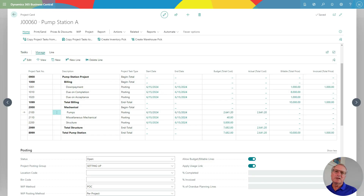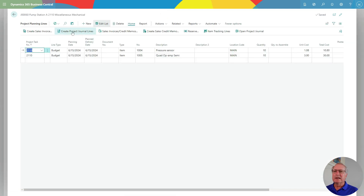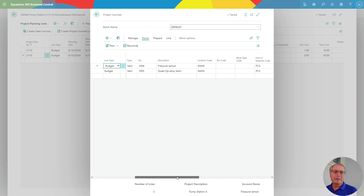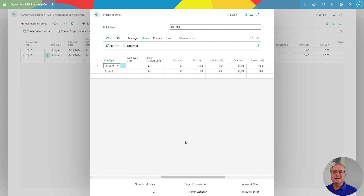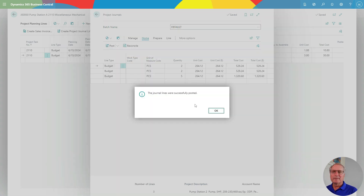The next thing to do is create a project journal for the additional items I added into this particular project. That's also easy to do. I'll go down, open up the planning line, and create project journal lines. Here's my project journal for those two items. I can go ahead and post them — it will take them out of inventory and put the cost into the project. And we're done.